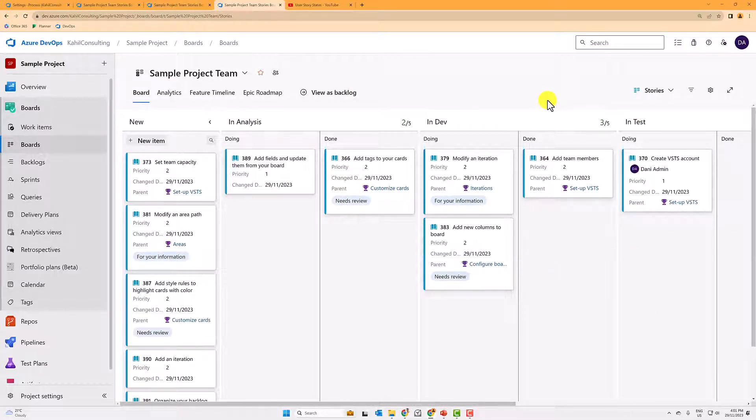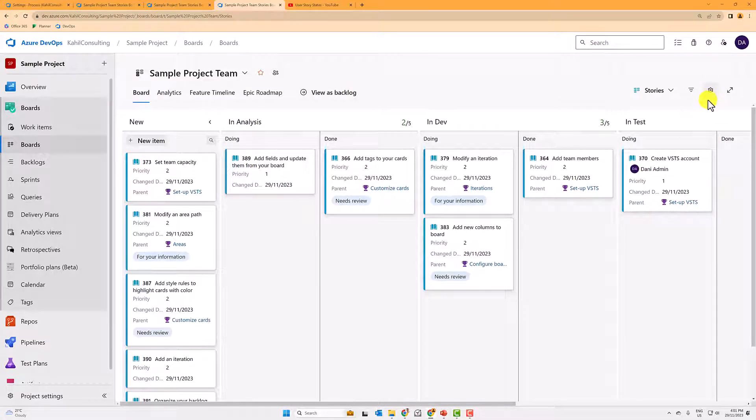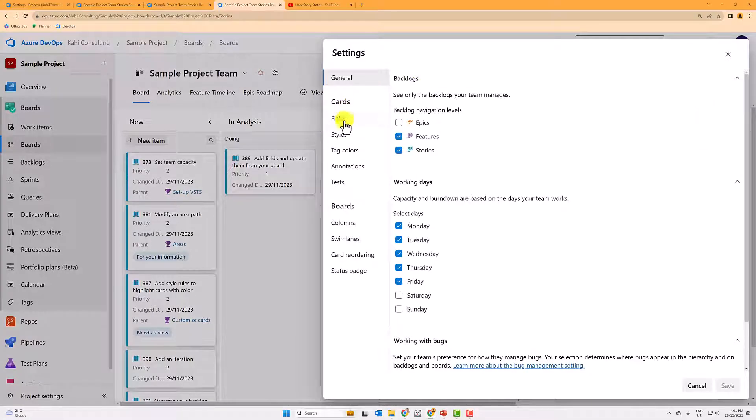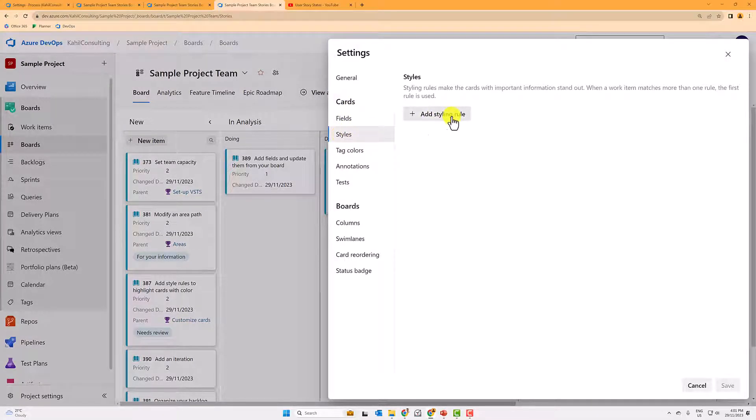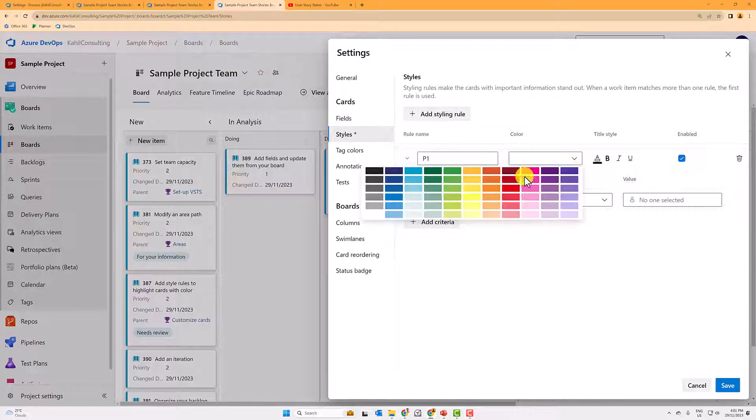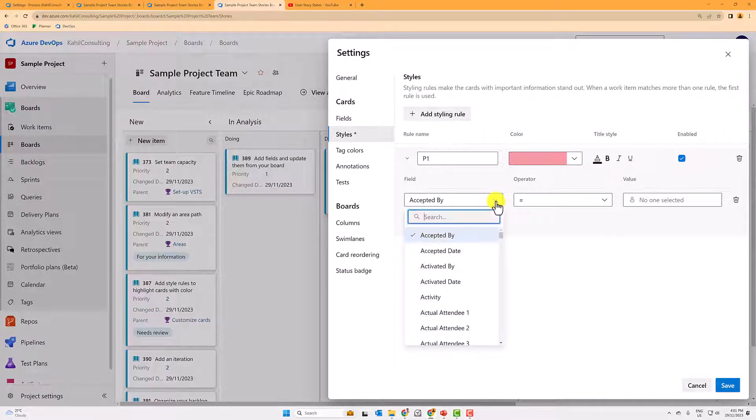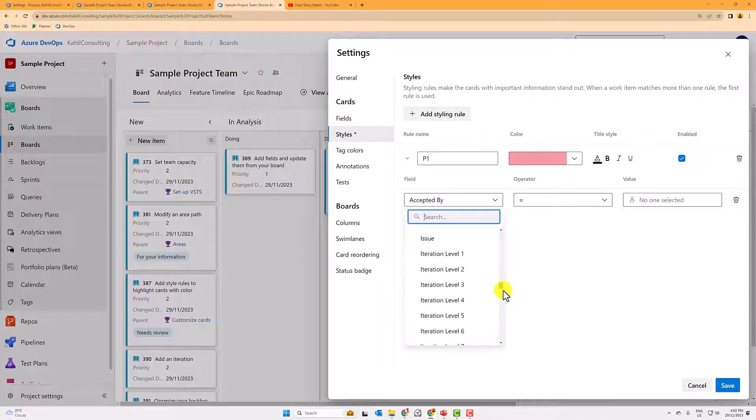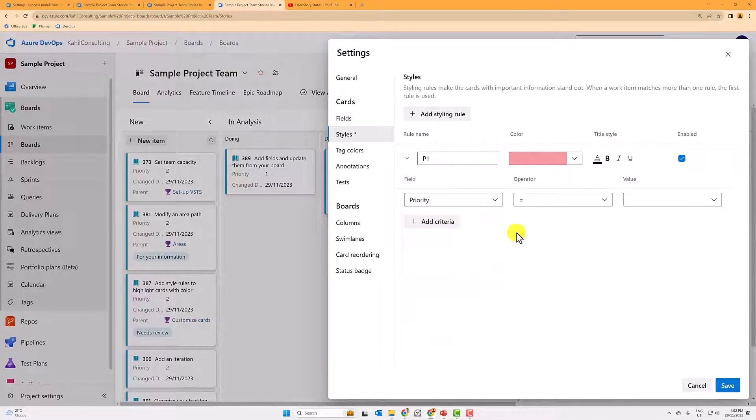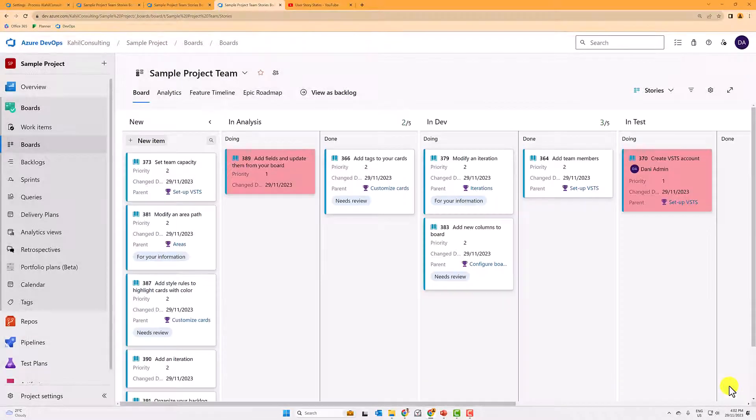So for example, you could say any of the user stories here on the board, I want to make the one that are in priority one stand out. So what you can do is effectively, again, go to and then go to styles. And you will have to add a styling where you enter the name, P1, whatever. And then you put, for example, a color. And the field is, now you decide the rules for your priority one equals one. And then effectively, you will now see those display in green.